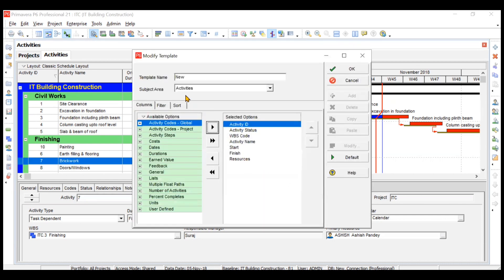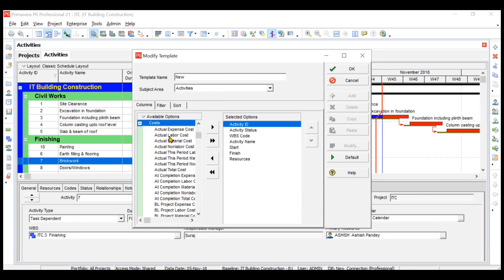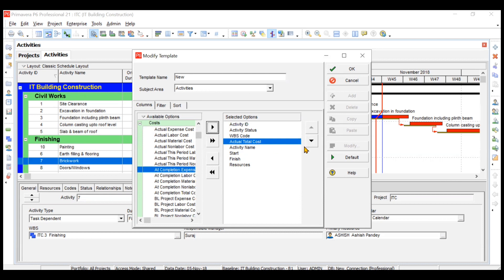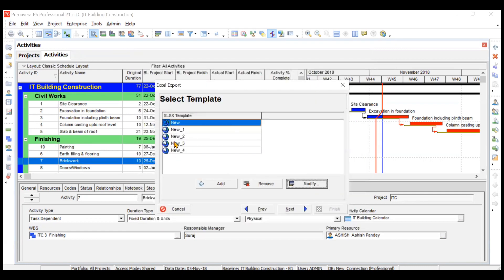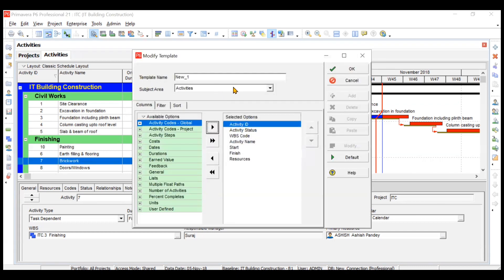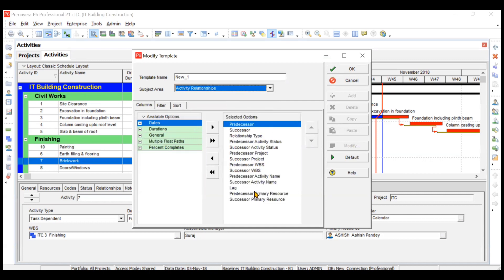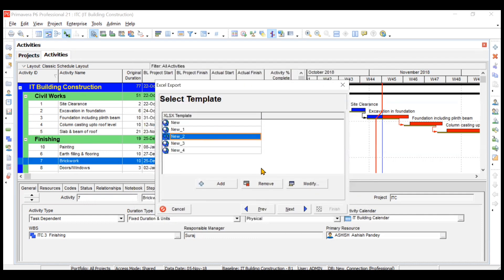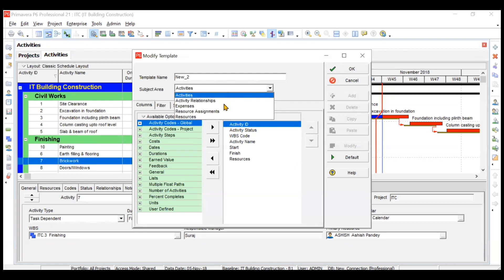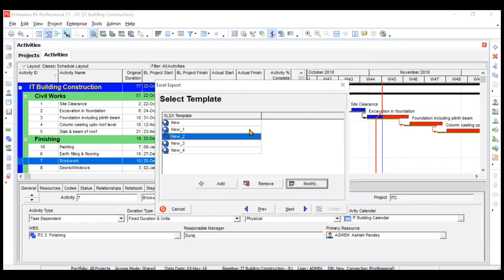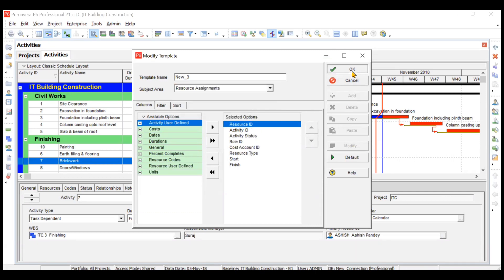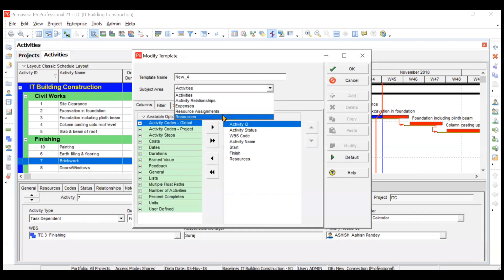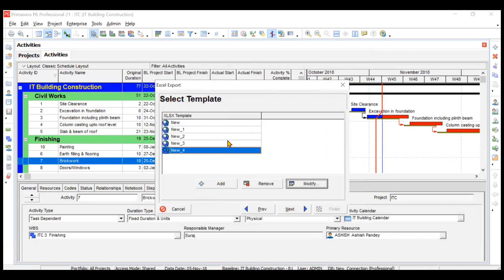There are several templates you can modify or add to. For activities, you can add columns like Actual Total Cost. The second template is for Activity Relationships — these are default columns you can modify. I'll modify the template for Expenses, adding any items you want. Then I'll modify Resource Assignments and click OK. Finally, I'll modify the Resources template and click OK. So we've configured our templates for the spreadsheet format.